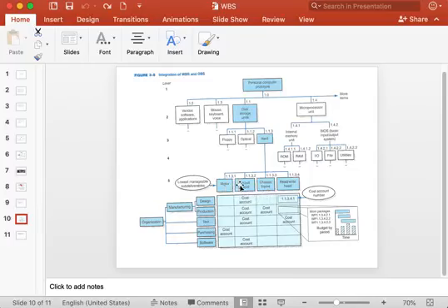So all these work packages, the responsibility of carrying out or completing them, can be given to different departments or units of an organization, which is overlaid in the horizontal direction like this, you can see. So this actually is showing the example of matrix project organization.